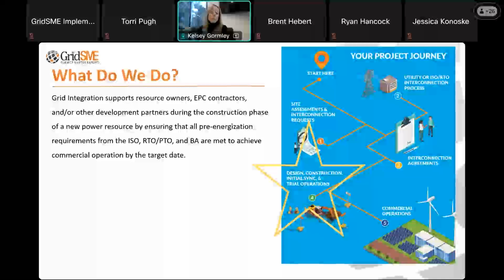We are recommending these days that the earlier we can get started with you, the better, especially if there are due diligence questions around metering or the project setup from a resource ID perspective. So for example, if you have a hybrid resource versus a co-located resource, that would impact how we would get started with the NRI process. Any changes to your interconnection agreement, technology, fuel types, and other factors that could impact CAISO's ability to model the resource accurately, we want to have those conversations with you early on before we even start to create projects and upload documentation to CAISO.